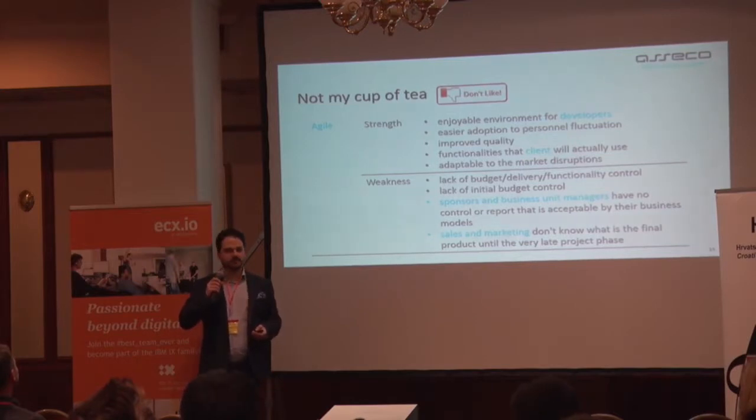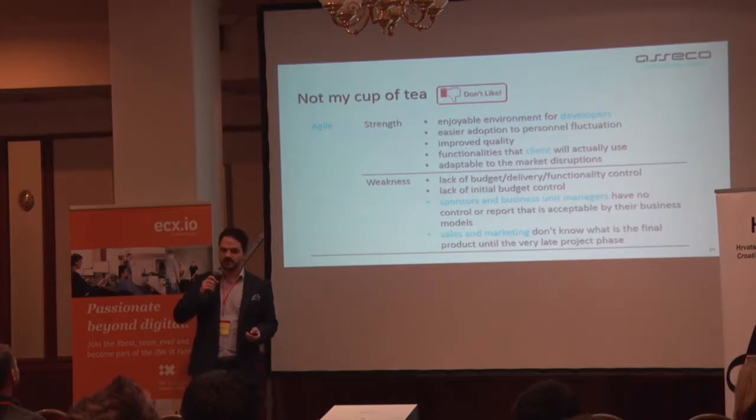They need the working environment that is changing, that is challenging, and our clients actually needed something at the end that was usable. If you follow the waterfall model, what we did before is develop for a long time, then try testing. You don't have budget for testing, you haven't tested it, you produce it into a release, and then your client has tons of bugs that he has to deal with.